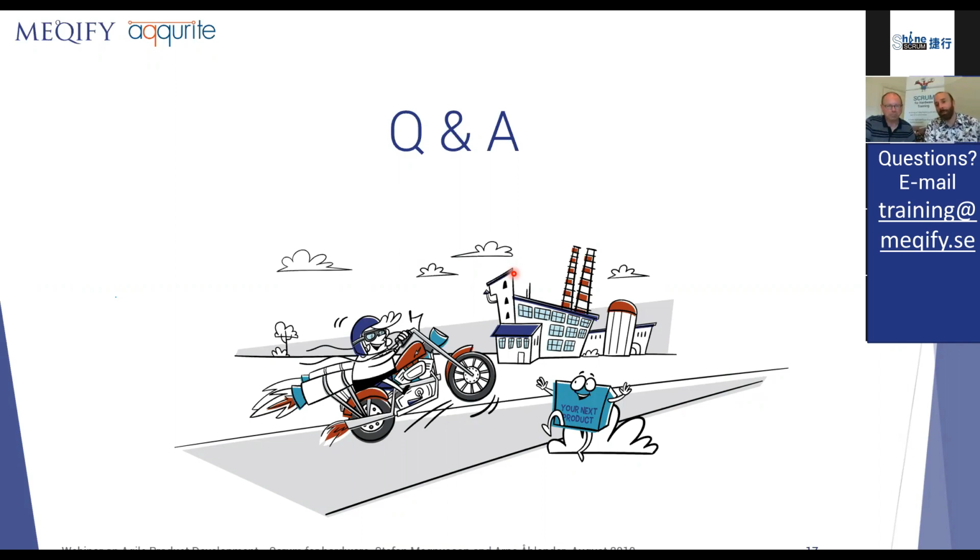So, okay, we will have problems with our cabling in this product. The second prototype had cardboard with glued-on connectors, in one-week sprints. The next iteration was a PCB without complete electronic tracks. It only had footprints for the connectors, so I could solder the connectors on in the correct location and have a PCB. It didn't work at all, of course, but it was still very useful in the design work. So you can do it incrementally in that way.